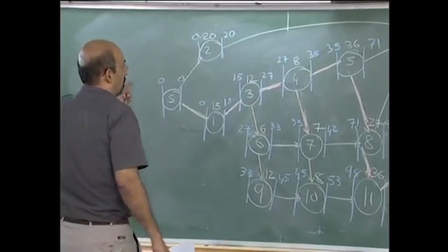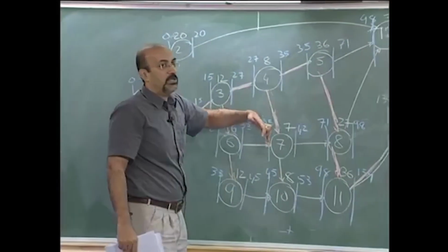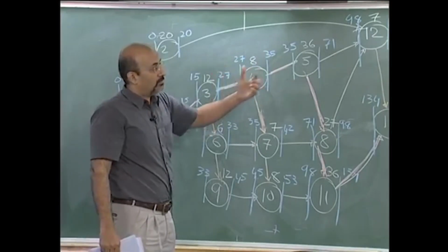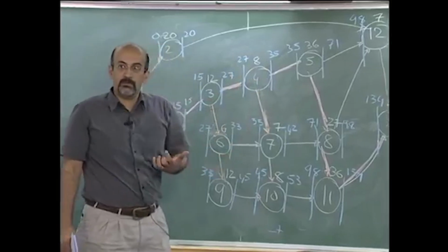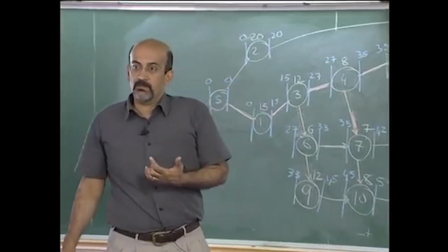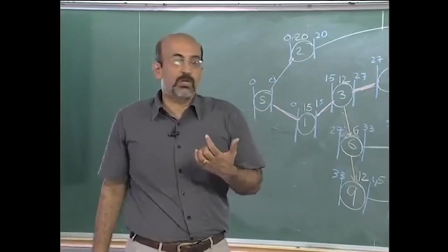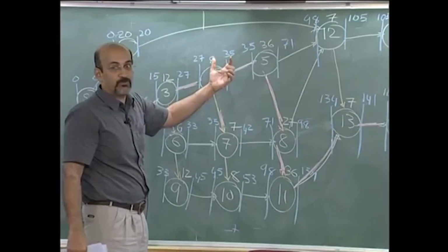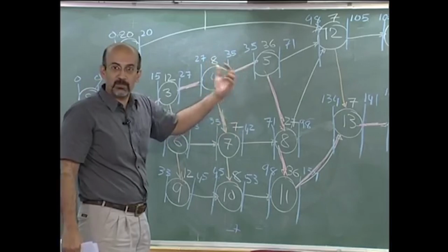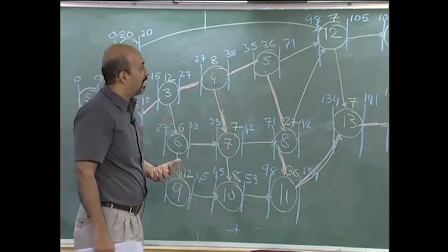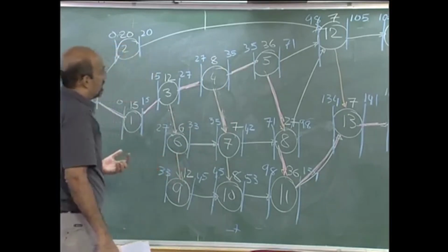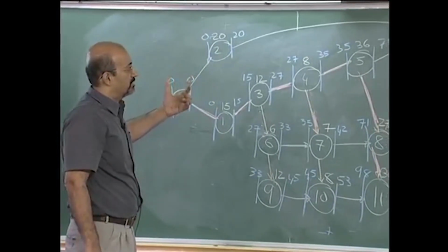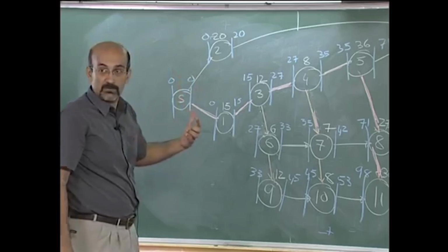Okay, so now again we start. Here there's a lot of opportunity for parallelization if you want to bring the duration down. Now what if 181 days is not acceptable? You have to get more resources, or there are many ways you can do it. In fact, we are assuming only one shift of work; you can do multiple shifts with the same resources, things like that. I'll take this up more for discussion. There are quite a few interesting patterns in this network.